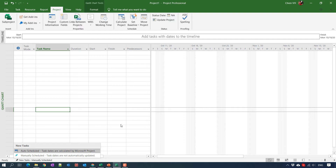When you set manually scheduled for all of the tasks in your project, it will be very difficult to manage the timeline. For example, when you create the first task and the second task, if you put all tasks in manually scheduled, the completed task is not auto-scheduled — meaning when you increase the duration of one task, the next task will not be adjusted automatically. So you have to change it from manually to auto schedule.